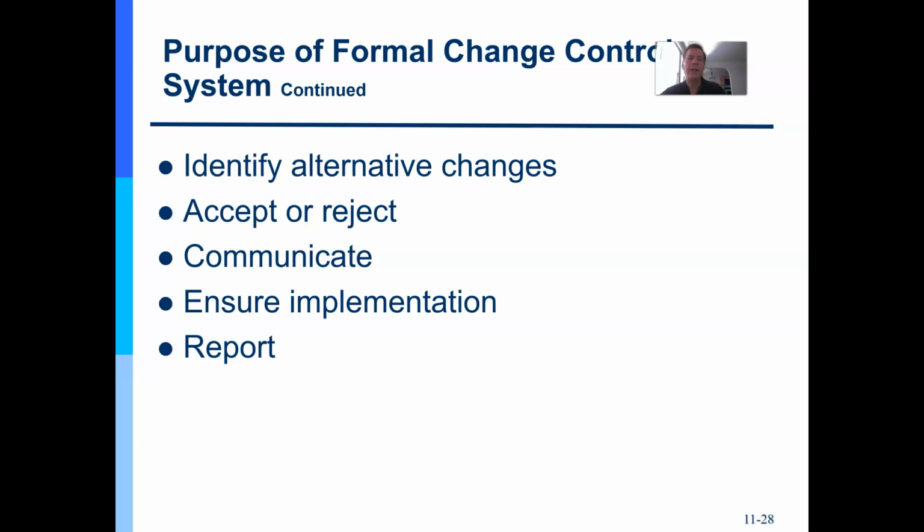And because in this collective, it's easier to identify alternatives, right, which help refine the decision and improve it in terms of budget and schedule, right, and scope. You can accept or reject it. You might even postpone it. But either way, you record it in your change control log. So you want a change control system with a change control board and a change control log. Record everything. And then, regardless of the decision of the change board, tell your key stakeholders.